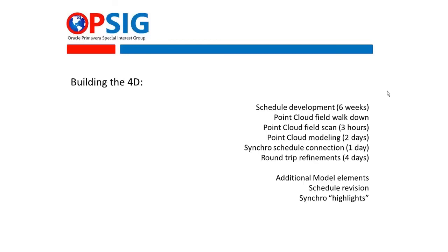And then I sent the P6 schedule and the Autodesk model from the point cloud to the Synchro partner at 10 a.m. on a Wednesday morning. The following day, we had a kickoff for the pilot, about 20 of the key team members. And as I sent this, I've been marking up pictures, had about a 45-minute meeting with the Synchro subject matter expert who's going to do this initial one for us as part of the pilot. Anyway, 24 hours later, he was ready with the initial pass based on pictures marked up, reviewing the model file, marking up some screenshots as we're on the phone.